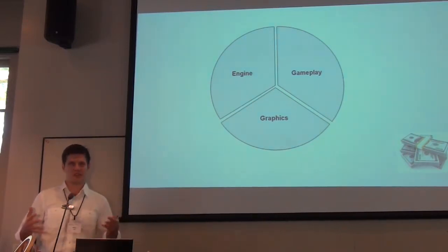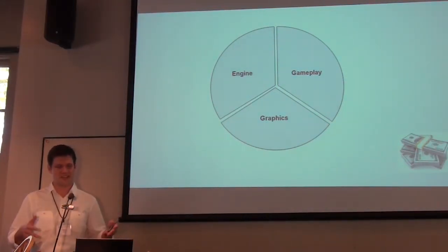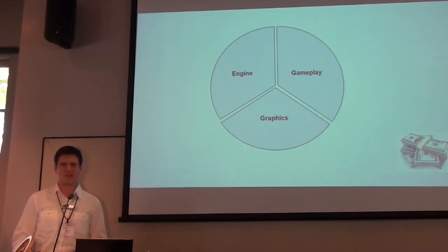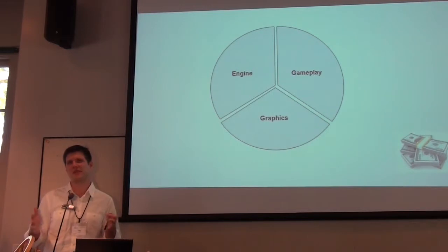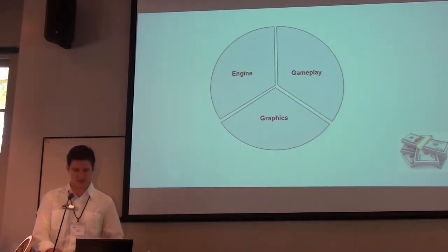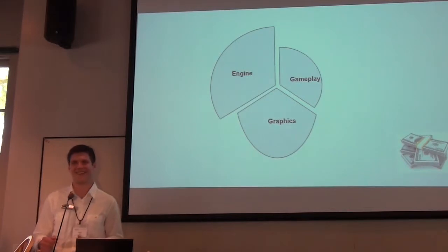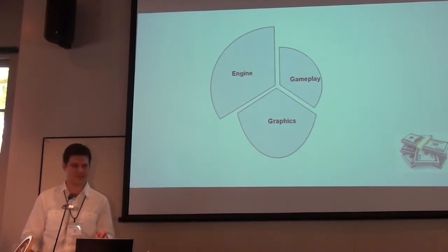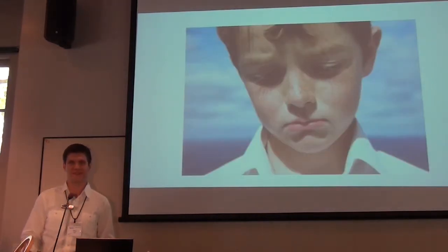Then eventually I'll be done, and I'll have to actually show it to people, show it to kids. So I take my game, I go into a class, and I show it to them. The kids are polite, but somehow they're like, oh well, this is okay. But you see they don't really engage. As the playtests go along, you realize it always gets stuck at the wrong spot. Something's wrong, and they don't really get it at all. Oh no! Actually, what they see as a sphere is this. And unfortunately, if you look at the budget I have left, I don't have enough money to actually fix it. So what I end up with at that point is a mediocre game.